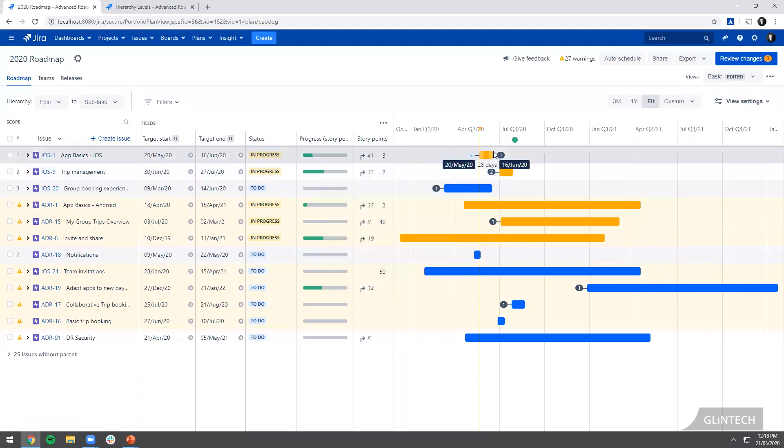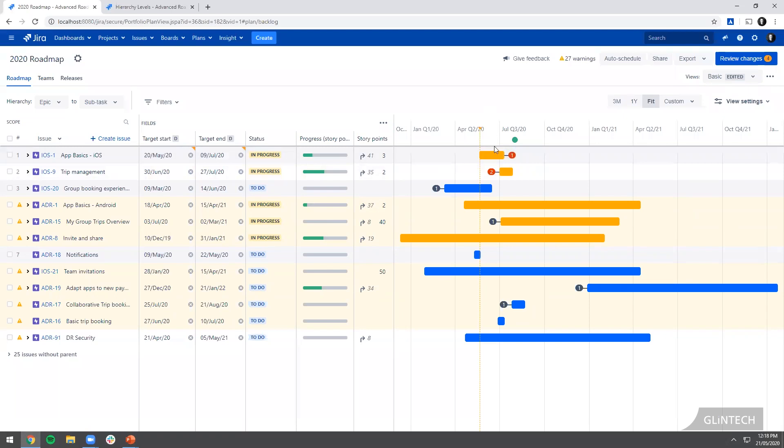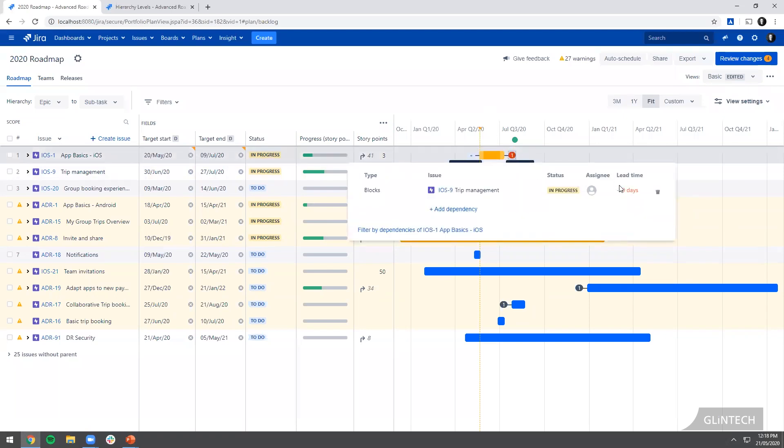What you'll see is if the people working on this particular piece of work were to maybe not finish it in time, as soon as I move that out it turns red. Now I'm seeing it red because I've got a negative lead time. So I've got a lag. I've got 10 days short, basically, to start my next piece of work.